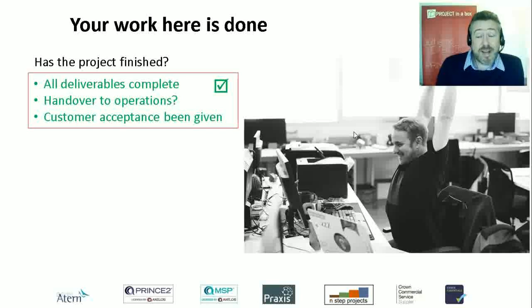And is that to the satisfaction of the customer, the operations group, whoever is receiving our project? Has acceptance been given and has that been documented? Has it been done verbally or have we got that in writing or an email or something of that type? So we ought to be absolutely sure in terms of documenting our project, and we had a session on delivery earlier where we talked about acceptance rather than delivery really being the important thing. Has all that been documented to our satisfaction? And here we're talking about the whole thing of the project, not just each of the separate individual deliverables.